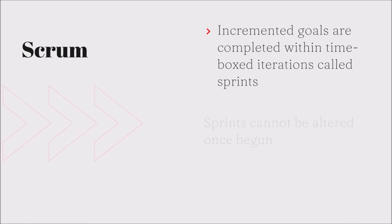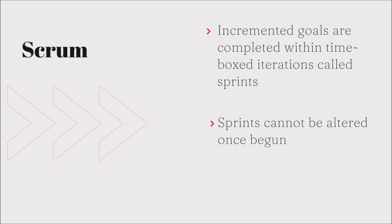Next is Scrum. Like the other Agile frameworks, the project is broken down into smaller incrementals. Incremented goals are completed within time-boxed iterations called sprints. Sprints cannot be altered once begun.